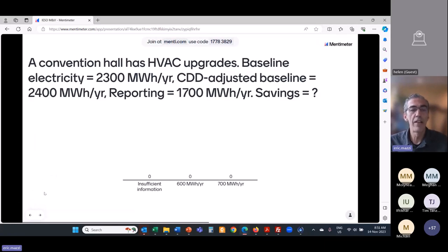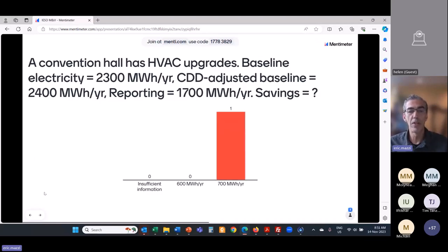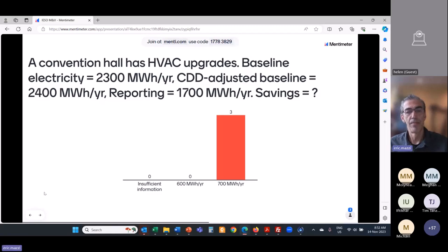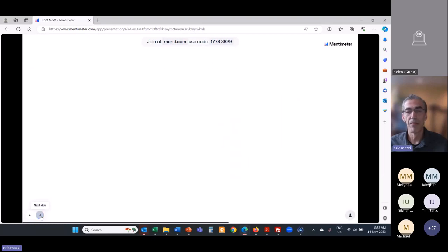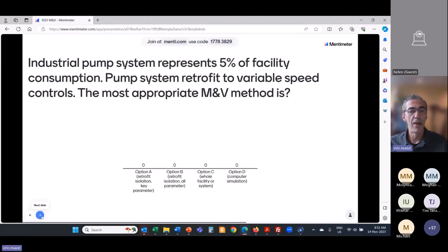A simple calculation: a convention hall has HVAC upgrades. The baseline electricity is 2,300 MWh per year. The cooling-degree-day-adjusted baseline from the baseline model is 2,400 MWh per year. Measured reporting period consumption is 1,700 MWh per year. What are the M&V savings? The answer is 700 MWh — not 600. It's not just what was measured in the baseline but the adjusted baseline. So it is 700, not 600, and you do have enough information.